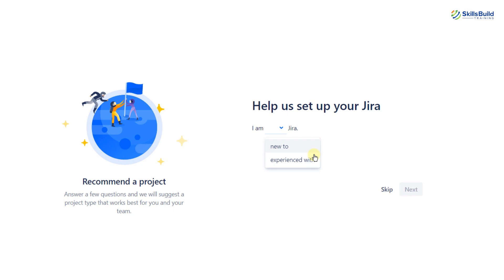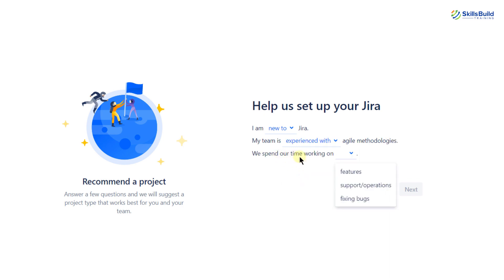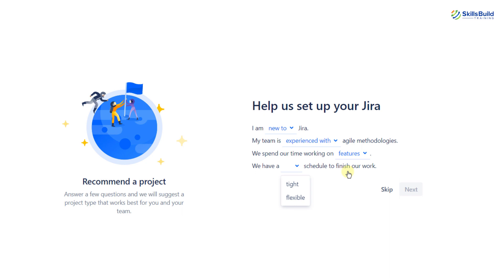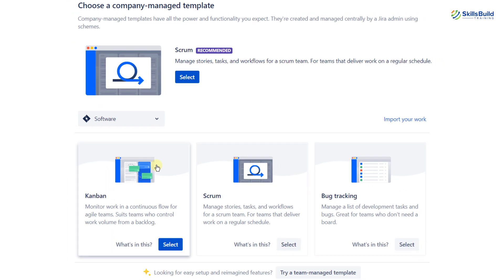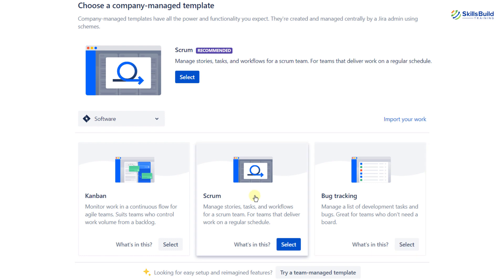Next it asks if we are new or experienced with Jira — I'm going with new to Jira. Then it asks if our team is experienced with agile methodologies. It also asks what we spend our time working on — I'm going with features. For the schedule it asks about, I'm going with a tight one. Then I'll click next. From here we have to choose a template: we have three options — Kanban, Scrum, and bug tracking. I'm going with Scrum.